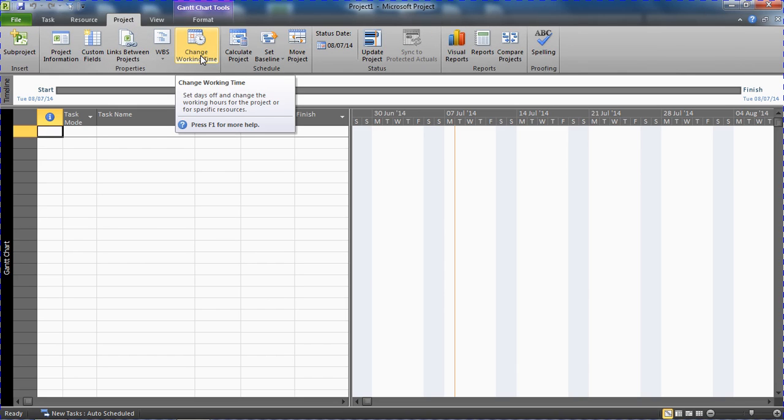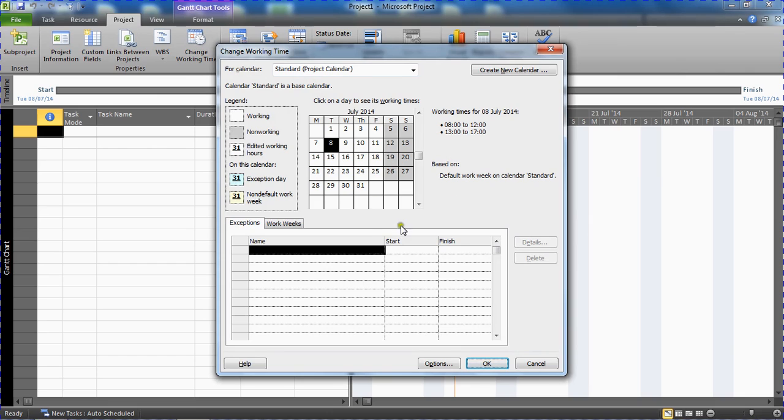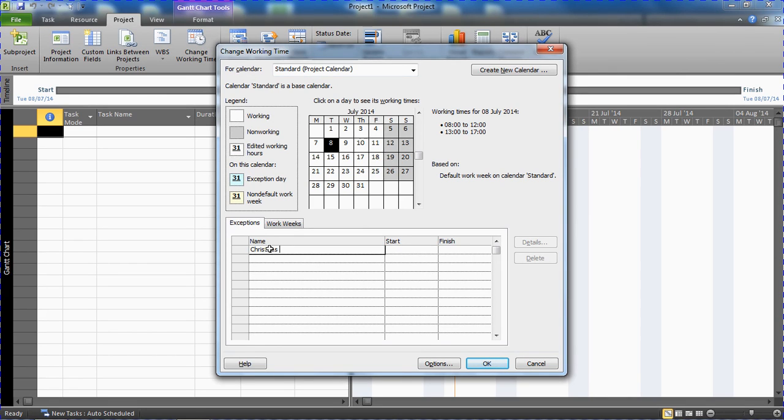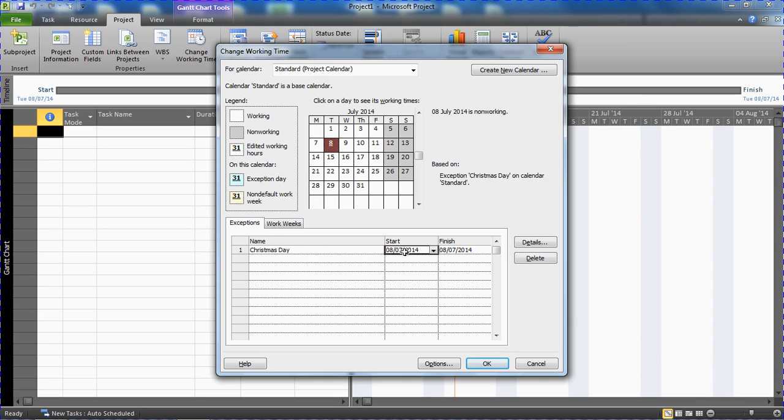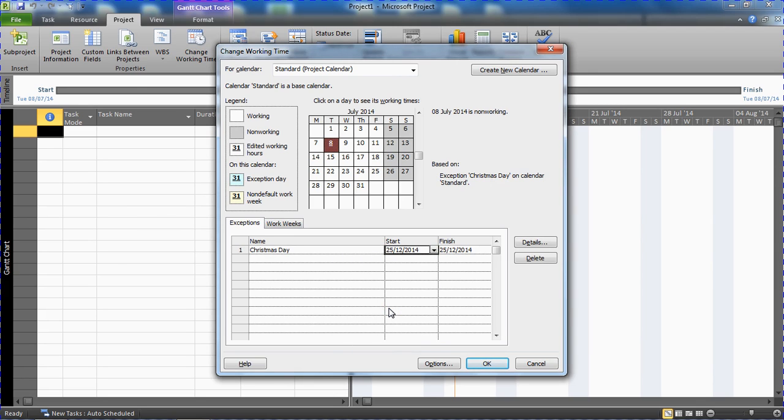So I get this dialog box appear to make edits to the standard project calendar, this base calendar that has been chosen for our project. In the Exceptions tab along the bottom, I'm going to enter a name for this non-working day, this exception, which I'm going to call Christmas Day. And I'm going to select the date from the right hand side here in the Start cell. So actually that's the 25th of December - it's a Thursday this year. But at the moment it's just one occurrence; it's a kind of ad hoc non-working day.